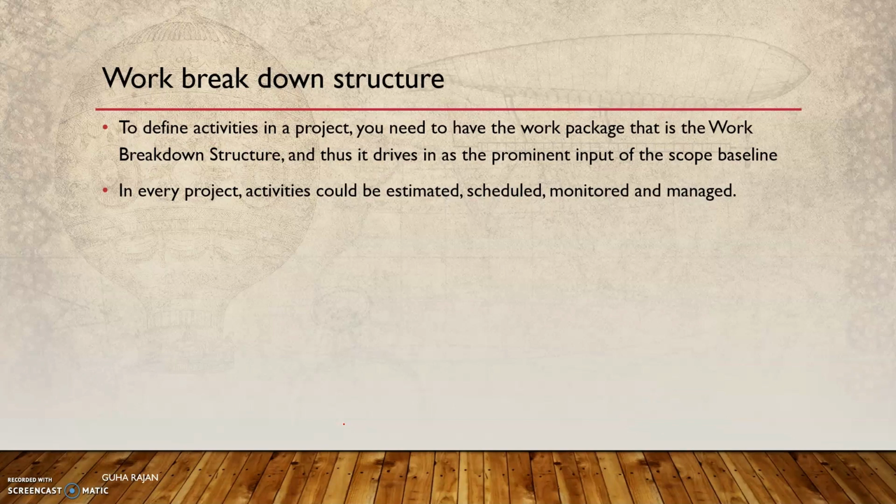From the activities, they will be grouped to form a work package. Or from top to down, you have a work and then you break it down into multiple activities, and that becomes a work breakdown structure. So to define activities in a project, you need to have the work package, and that is where the work breakdown structure becomes prominent. It becomes a prominent input to the scope baseline.